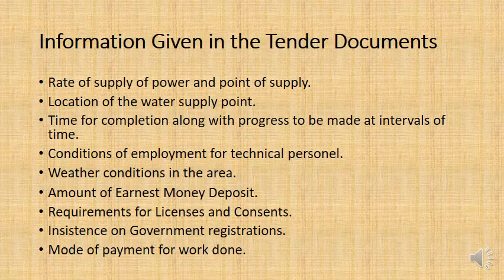And so if you've got requirements for the contractor to meet certain conditions, then you need to actually state that in the tender documentation, because all of this is going to influence the price and the bid that the prospective contractors are going to submit.